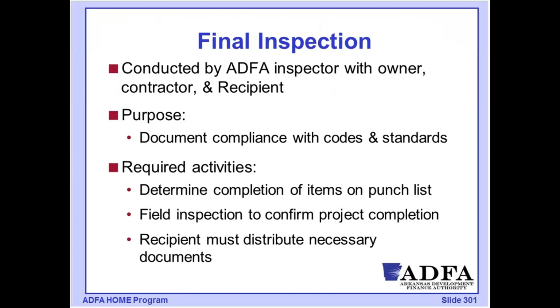The final inspection on the property: we said that all HOME properties, when they're completed, need to meet all of the applicable standards, and so ADFA needs to be able to ensure that each of these properties meets that standard. The final inspection is conducted by the ADFA inspector along with the owner, the contractor, and the recipient.